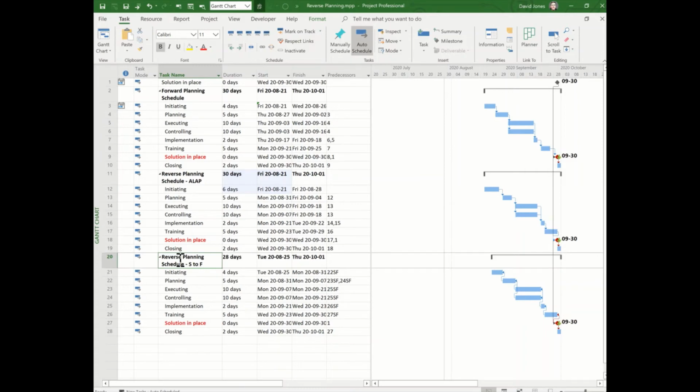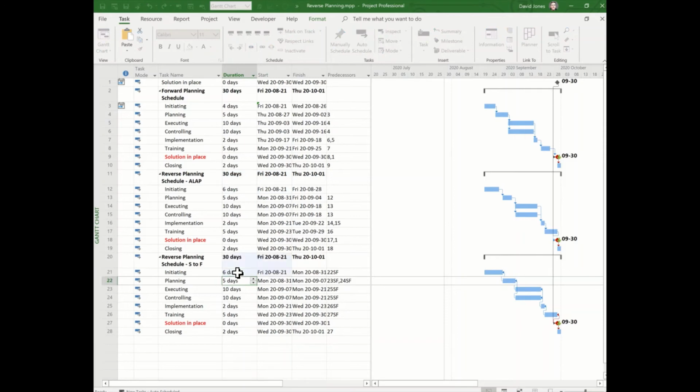In the third plan, we're using the start to finish relationships. This schedule is working now too, and again we can see the start of August 25th. The start to finish relationships are notoriously risky, however, so this might be a good way to do some what-if planning, but maybe not a great way to run your project. Again, we can build in some contingency by adding some time to activities. When you've landed on your schedule, it's all resourced and you have agreement from the project team and sponsor, you'd baseline your schedule.